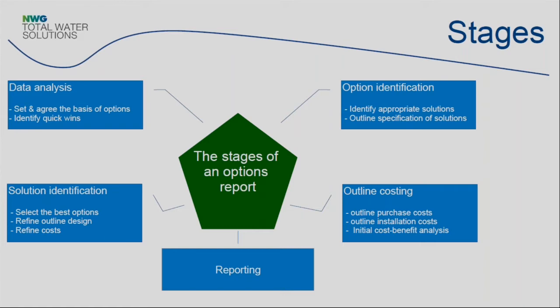You tie all this up into an auditable report. And this is effectively your summary of why you made these decisions. So if we go back to the office retrofit, in there, that would say, this is why we've done this. This is why we have made these decisions. This is why we think the investment is likely to be this, because we got these costs from these suppliers. So this is the reporting bit, is the key thing. This is the deliverable, and this shows the audit trail.